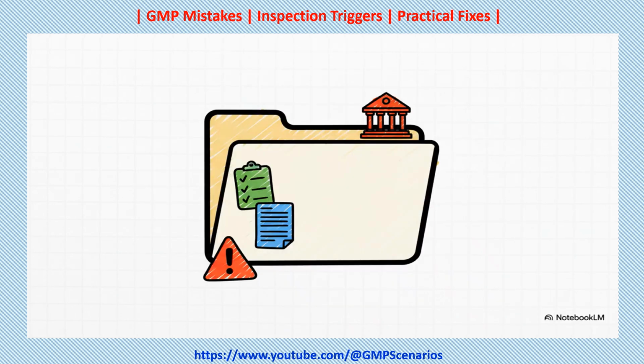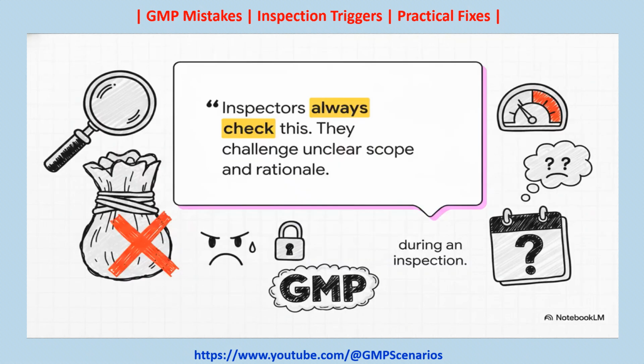But honestly, this one might be the most dangerous of all. Bundling can completely mask the real regulatory impact of a change. You might have a tiny equipment part update that, on its own, would need to be reported to a regulatory agency. But if you bury it inside a big, minor change that's mostly just SOP updates, well, that critical reporting step can easily get missed. And that is a massive compliance gap waiting to be found. And believe me, inspectors live for this stuff.